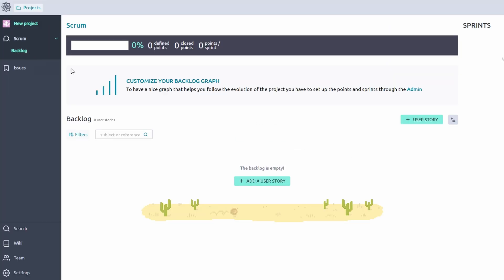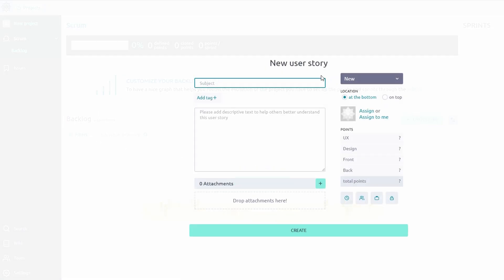Sprint planning—break your project into smaller, timebox sprints. For example, if your project is Launch New Website, you might plan a two-week sprint focused on Design Homepage or Develop Contact Form.